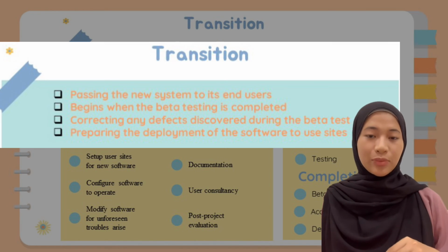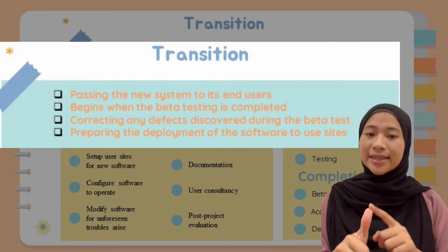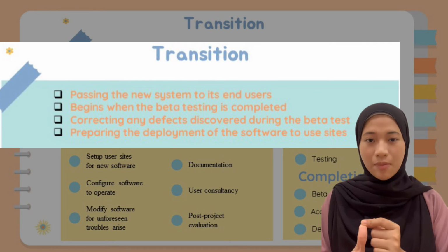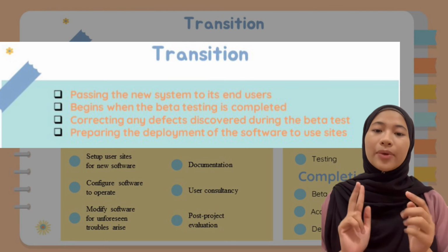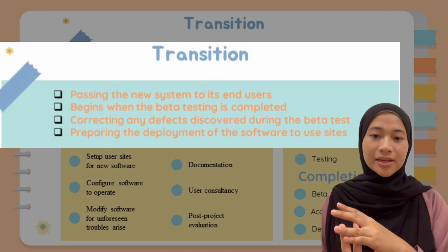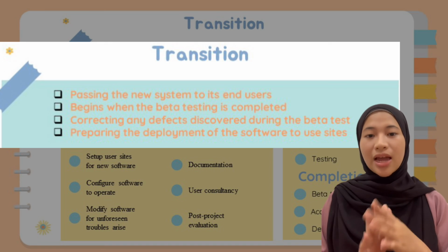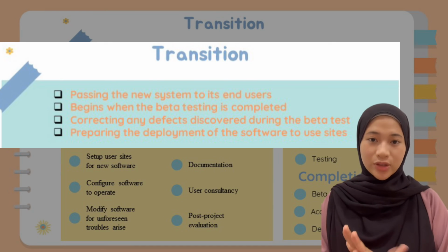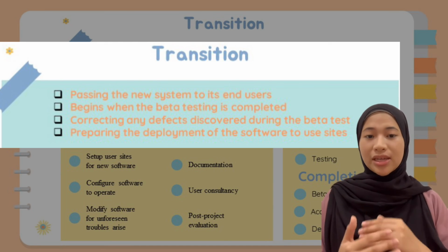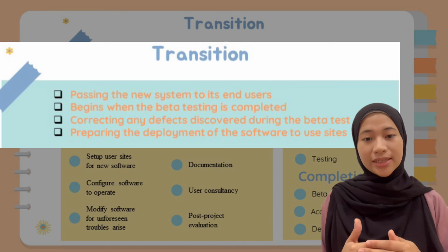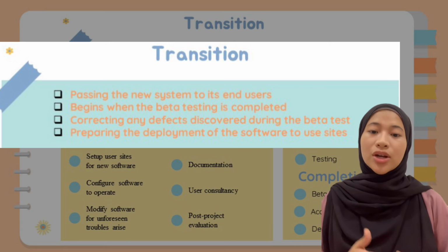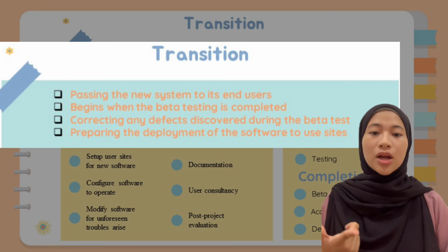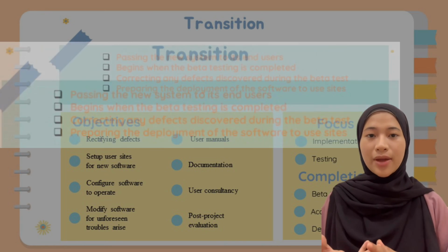In this phase, the project team will focus on testing and validating the complete system, operating the system alongside any systems that are being replaced, implementing the legacy systems, training the customers, and preparing the deployment of the software. As the project team focuses on those activities, it will produce the final product baseline of the system, training materials for the system, documentation, and user manuals.